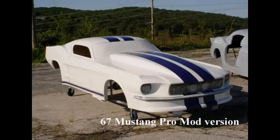Budget allocation, a budget is allocated for each part category based on market research and supplier capabilities. Engine block, $30,000. Cylinder heads, $22,000. Fuel system, $20,000. Vendor research, the procurement team researches potential vendors who specialize in manufacturing top fuel drag racing parts. They prioritize vendors with proven history of supplying parts for cars in the 6.4 second range, documented quality control processes and certifications, and ability to provide technical support and replacement parts quickly, within 24 hours, to minimize downtime during car assembly and testing.